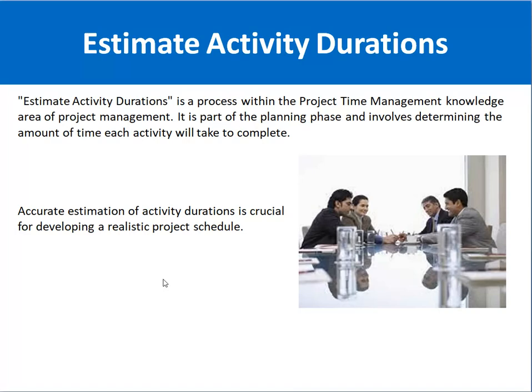For example, let's suppose you are implementing an e-commerce solution and there is a task of software development. How much time is required for software development? There is another task for quality assurance. How much time is required to complete the quality assurance? There is a task of production deployment of the release. How much time is required for production deployment? Once you identify the durations and accumulate them, you can calculate the overall time required for completion of the project. So accurate estimation of activity duration is crucial for developing a realistic project schedule.